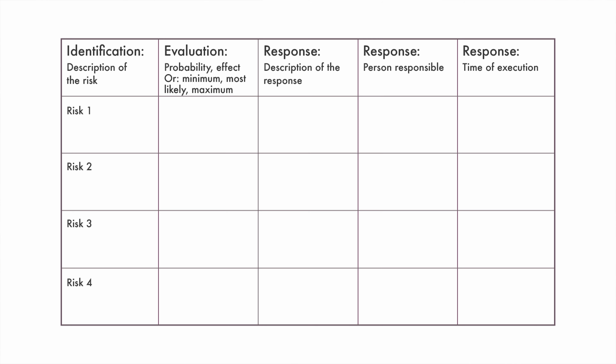Maintaining an up-to-date project risk list, like illustrated here, is an important tool for managing risks across the project lifecycle. Here it is ensured that each identified risk is evaluated and that a specific response is allocated to it. In addition, a responsible person is named to ensure that the response is deployed as agreed. Making sure that each risk has a responsible person is important, as evidence has shown that if risk management is purely a collective activity, it is often overlooked and poorly implemented.